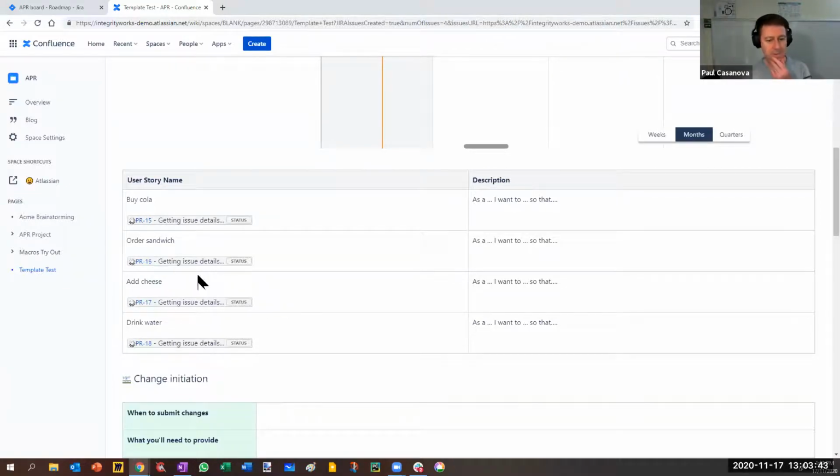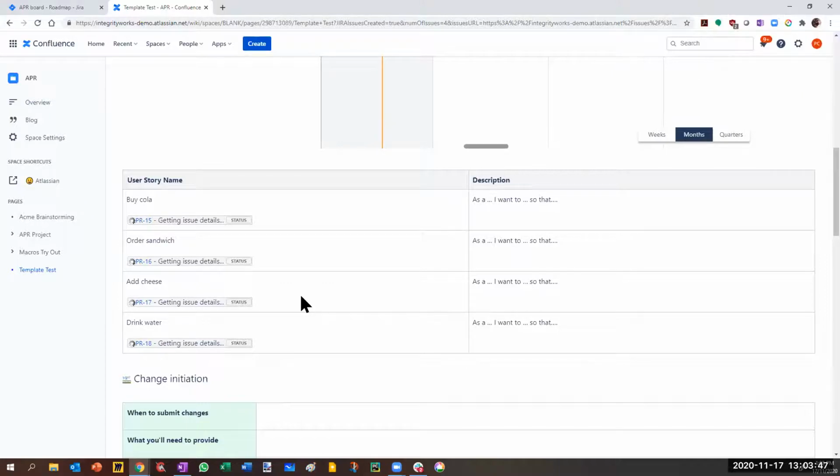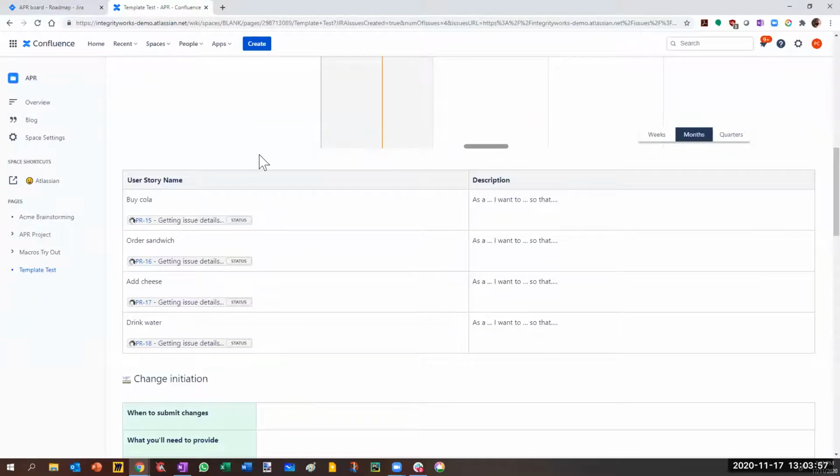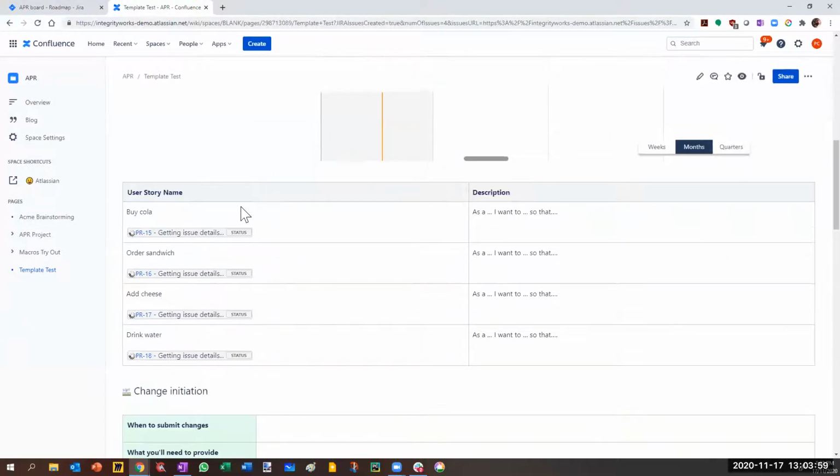Now it hasn't linked to the epic though. I think I may need to create the epic first. So let's say the epic name is plan a healthy lunch with family, and then we create that as an epic, and then subsequently we can create those four as stories linked to that epic.